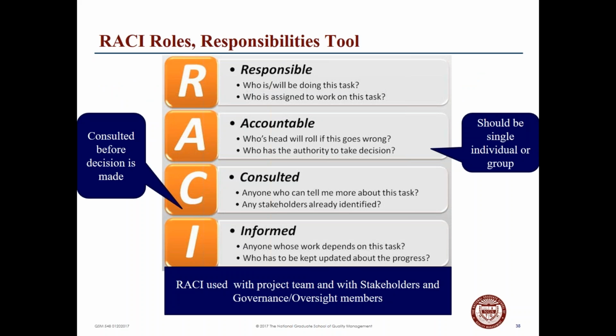So a few minutes ago you saw the acronym RACI, and we want to talk about this. This is a tool that talks about responsibilities. So who's responsible for the task? Who has been assigned to work on the task? With the always question in projects, who's accountable? Should this be a single individual or a group? Basically, whose head's going to roll if this goes wrong? Or who has the authority to make a decision?